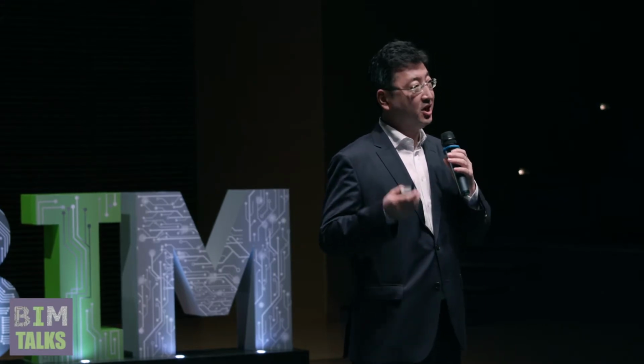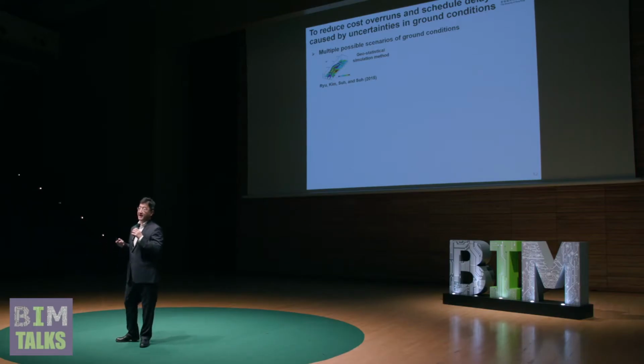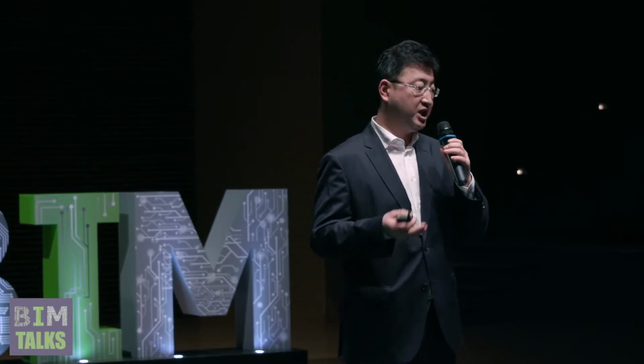Construction engineers for tunnel construction often encounter problems of cost overruns and schedule delays. To reduce these cost overruns and schedule delays caused by uncertainties in ground conditions, we figured out what we have to do. First, we have to consider multiple possible scenarios of ground conditions, and we also consider multiple excavation schedule alternatives, considering different types of equipment.